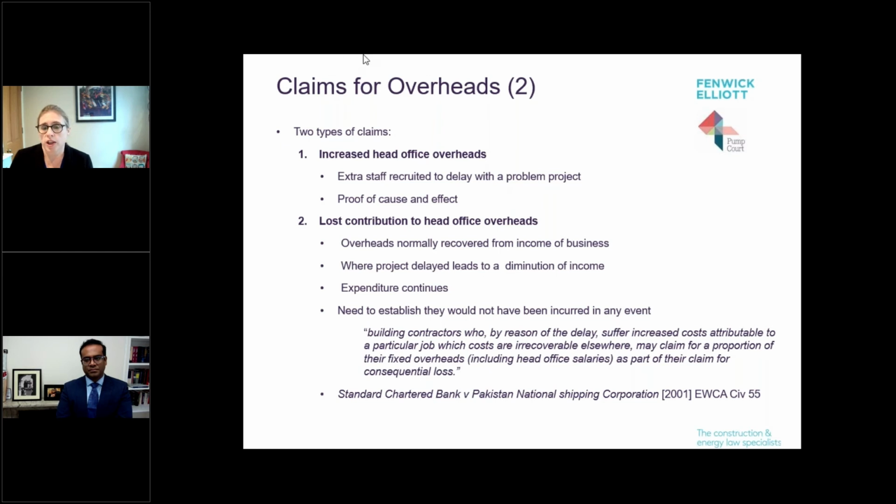Alternatively, lost contribution to head office overheads. We are not bringing in the income we expected because we're working so hard on this project, it's going on and on, but we're having to spend a lot of money on this anyway. You need to establish that they wouldn't have been incurred in any event, but otherwise it is a valid head of claim, and you'll see the Standard Chartered quote there.